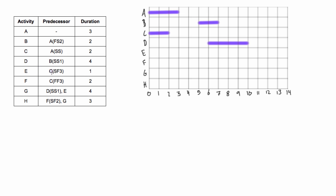Activity E depends on activity C, and it's a start-to-finish relationship with a lag of three. The start-to-finish relationship is the weirdest one. It's a lag of three, so we come out from the start of C and go one, two, three. Because it's a start-to-finish relationship, E can finish three days after C starts. With a duration of one, we count back one from there, so activity E happens for just that one day.